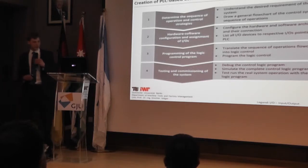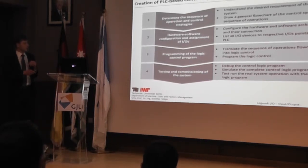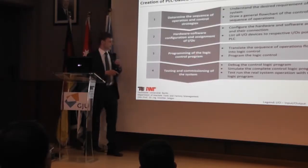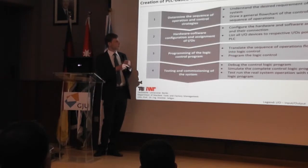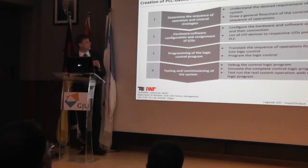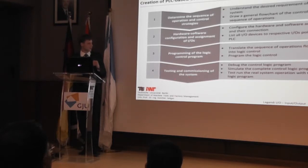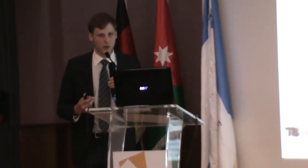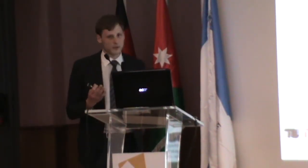Similar to this is the creation of a PLC-based control system. First, you determine the sequence of operation of the control strategies by drawing a flow chart. In a second step, you do hardware/software configuration, assigning every input and output a specific address in a list. After this, you program the control program according to the flow chart. A very important step is testing and commissioning — only if the PLC code is tested sufficiently can your factory run properly.